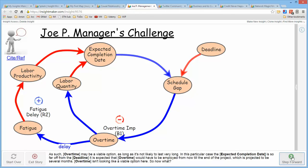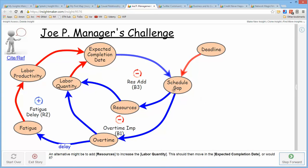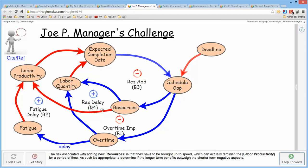Continuing, the schedule gap also encourages adding resources. Adding resources increases labor quantity, which reduces the expected completion date and therefore reduces the schedule gap. Walking this loop, it is another balancing loop — a resource addition loop. However, adding resources also has a tendency to initially reduce labor quantity because of the effort required to bring them up to speed. This reduces labor quantity, increases the expected completion date, and makes the schedule gap larger. Walking that loop from schedule gap to resources, we again count two opposite influences — an even number — making it another reinforcing loop taking us in the wrong direction.